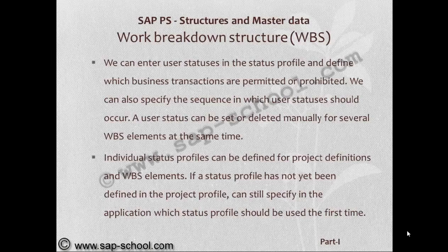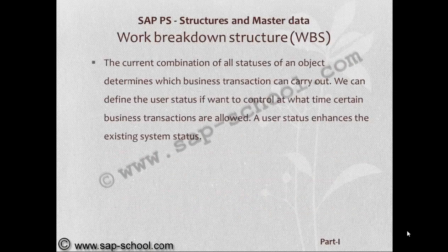If a status profile has not yet been defined in the project profile, we can still specify in the application which status profile should be used for the first time. The current combination of all statuses of an object determines which business transactions we can carry out. We can define the user status if we want to control at what time certain business transactions are allowed. A user status enhances the existing system status.